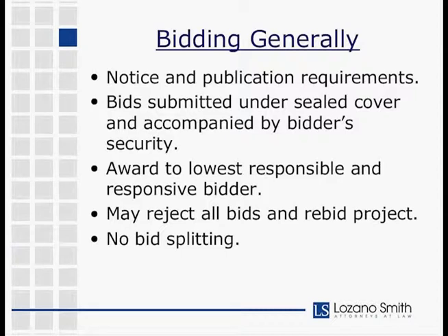And it doesn't have to be a bid bond. It can be cash, cashier's check, or I believe it's certified check, or a bid bond to the district. The same requirement is not contained in the provision that applies to other types of purchasing, like equipment and supplies. So technically, no, it doesn't appear that a bid bond is required for those types, including janitorial supplies.